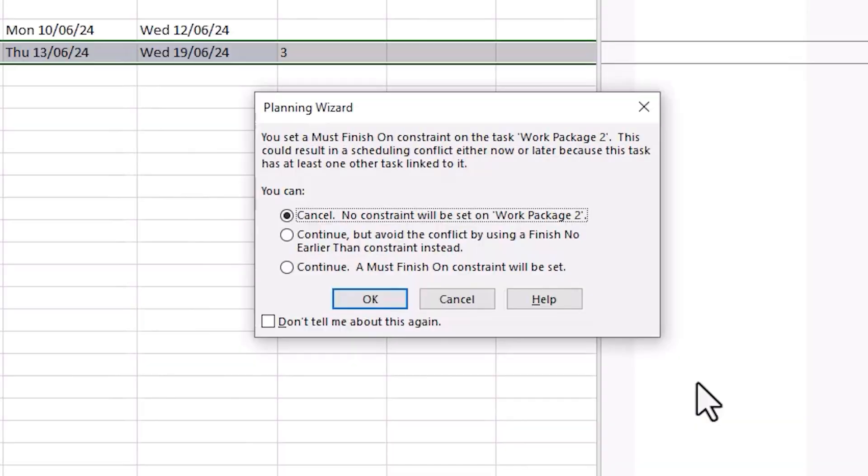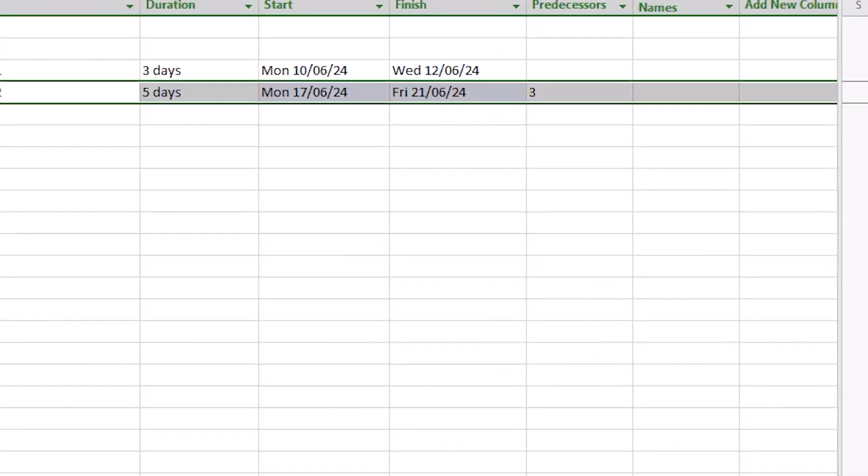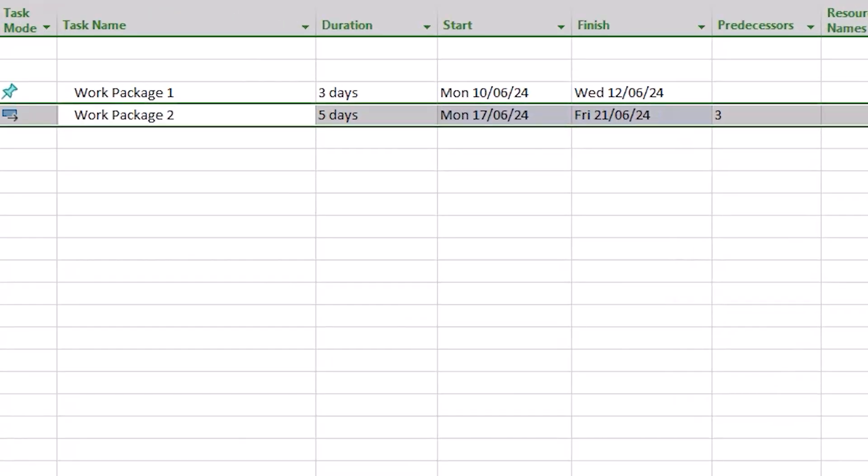Straight away the planning wizard, cool name, appears with a warning to tell us that because the task is linked to other tasks we could have scheduling conflicts either now or in the future. It gives us a chance to remove the constraint, to change it to another more flexible option, or to continue with the existing constraint. And that's the option I'm choosing. The task's dates are changed accordingly.